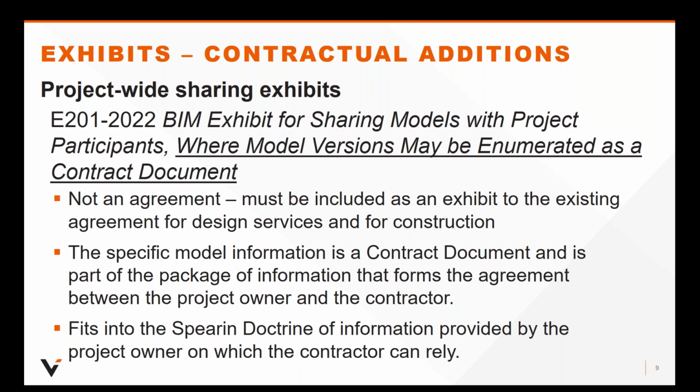talking about. There are level of development definitions in E201. Each level of development is defined in Article 4 of E201, and also in E202 for that matter, and communicates both the minimum amount of data required to reach the defined LOD and the maximum extent to which the model element at such a level of development can be relied on for the defined and authorized uses. Okay? We'll look at this article in more detail later in the program. The LOD definitions are used in the model element tables to establish how each model element will be developed as the project progresses. And as I said, this is not only in E201, it's also true with E202.